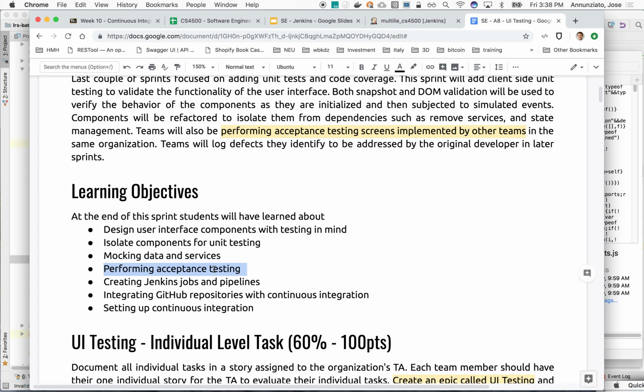I'm hoping that most of them might be very low level defects. And at some point, the project manager and the product owner are going to go through all these defects and assign them to be addressed at a particular sprint. Right? They're going to go through it and give them priorities. Some of them are very low priorities, things that are nice to have, but we don't really have time for that, and things that are very top priority that need to be addressed right away. So be as rigorous and detail oriented as possible.